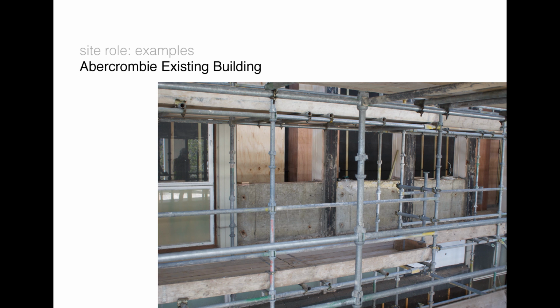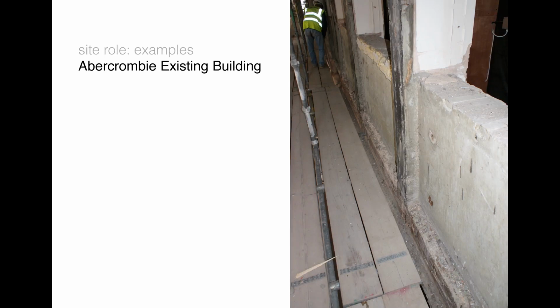So, just another view from inside. The contractors on site at this stage said, we've discovered this beam. We need to crack on because it's delaying us. What do you want to do about it? We can either chop the beam out and add some steels underneath, or we can clad over the beam.